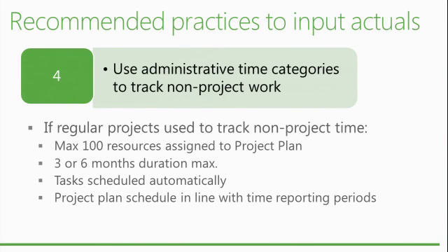This is a thing you cannot do in 2007 because you have a format for the field, the cells. It expects to have a valid value. If you try to input anything else, it will tell you, well, no, it's not valid. You have to change it. So the manual scheduling was really for that type of thing.